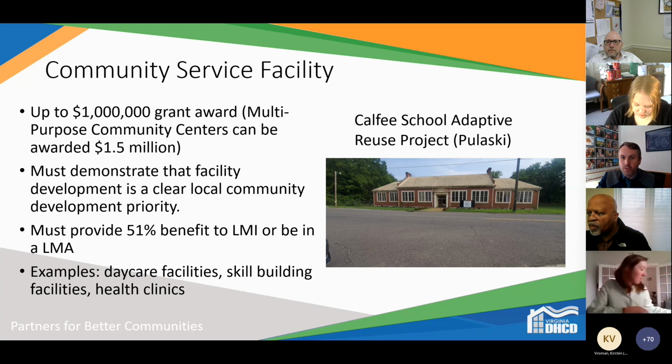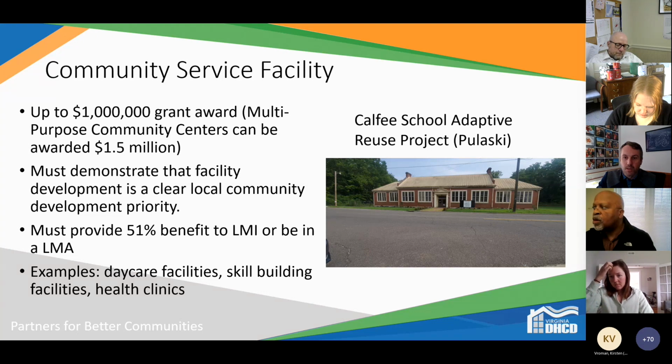So Vaughn posted, is BABA something we'll have to monitor with respect to our contractors and the materials required? And so Amanda Healy provided a response saying it looks that way at this point. I think with more determination needed to make that full on, but it says in the 2023 CDBG contracts that we'll have to monitor that, as well as it needs to be reflected in local bid docs and the contracts for those projects. Amanda, do you want to expound on that?